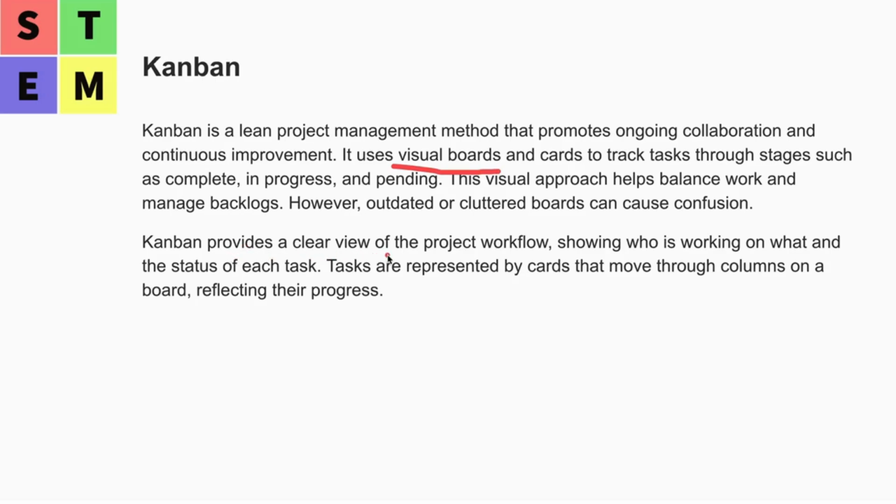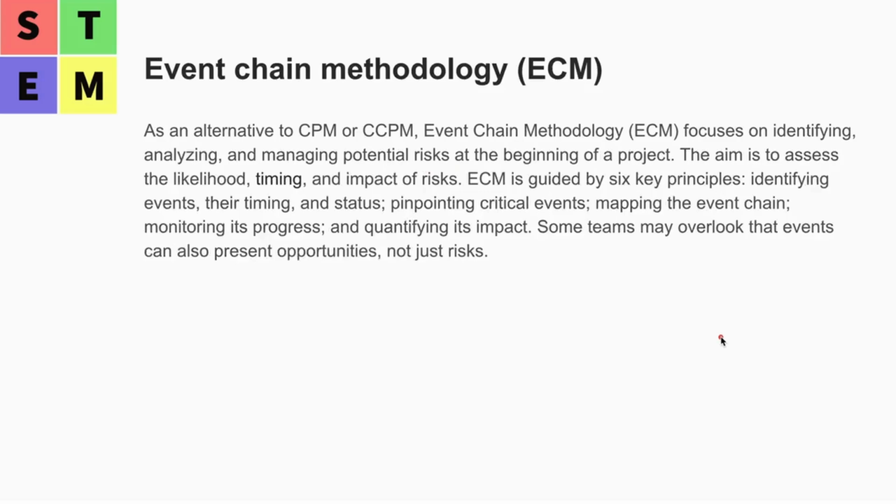Kanban provides a clear view of the project workflow, showing who is working on what and the status of each task. Tasks are represented by cards and moved through columns of a board, reflecting their progress. Basically there are a few sections and tasks move through them. That's Kanban.